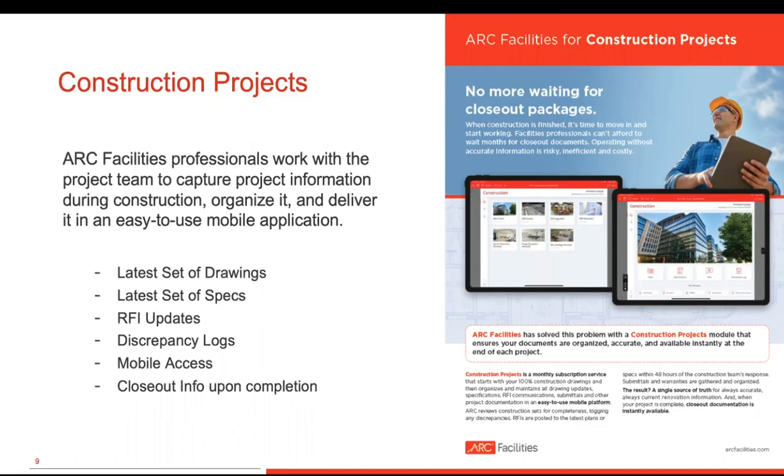And so, the renovation gets completed, the new building gets completed, whatever, we get to commissioning, turn it over. All of a sudden, the facilities team is handed a set of keys to a building they know nothing about. And I think we all know that in most cases, the closeout package does not arrive on that day. Right? In most cases, the closeout package may follow 3, 4, 5, 6 months later. And what that means is you've got a facilities team who's trying to operate a building they know very little about for 6 months before they get any of that information. At that point, they may already be starting the next renovations and not even have the as-built for the one that just completed.